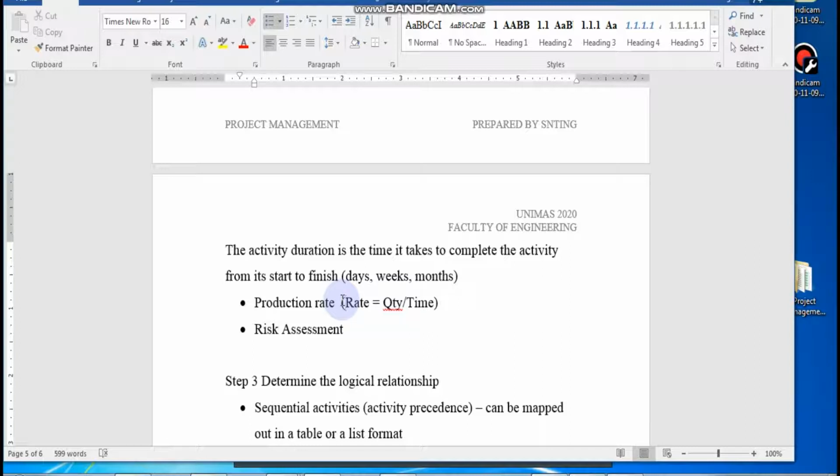So if you put in the activity duration and straight away you want to draw your time chart, it is fine. Okay, but there's another thing that I always emphasize for our engineers to do, is think about risk assessment. Assess the list of activities depending on the risk. Think about whether some of these activities may be affected by certain unexpected things.